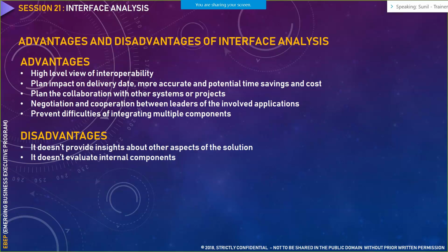particular project. I'll give you an example of what happened in my project recently. So we had this vendor Verisk, wherein we used to get information. This was a third party system, Verisk system, wherein we used to get information about the replacement cost estimator, about a particular component in our homeowners insurance. Now their system was not functioning properly. Now they gave us an SLA that within 2 weeks they should be able to fix their system and we should be able to consume their services on our core application.